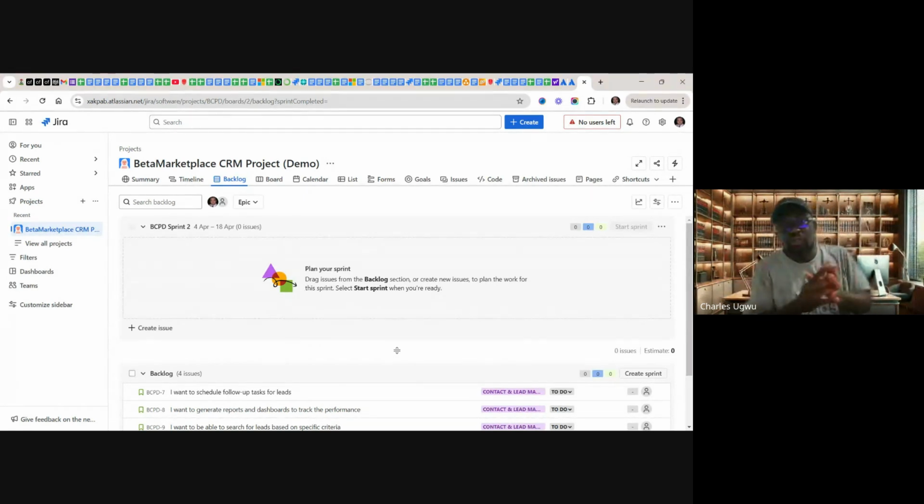I've seen so many business analysts or scrum masters who, during the sprint demo, will come with slides and start showing stakeholders slides with charts. No, we don't do that. Demo is practical. You need to demonstrate the work you've done within the software.